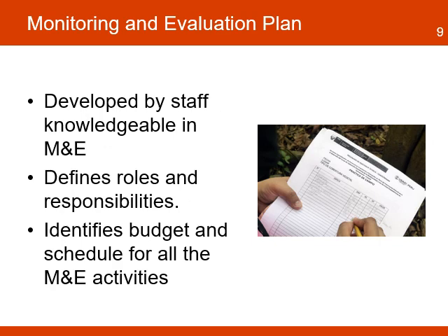The M&E plan should be developed by staff with M&E experience, with input from the teams involved in designing and implementing the project. Some organizations have a dedicated M&E unit whose role is to assist all projects in the use and application of M&E standards. The M&E team sometimes takes responsibility to manage the M&E plans for those projects that don't have the expertise. The plan defines the specific roles and responsibilities of all those involved in the M&E process, including the roles of partners and key stakeholders. The plan also identifies the cost and the schedule for the M&E activities. This information needs to be integrated with the general implementation plan of the project.